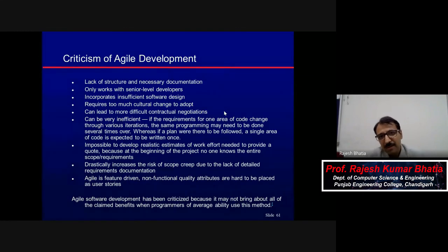But in this case, in 2 to 4 weeks, you have to identify those features and their importance, prioritize them, design them, develop them, and at the end get it validated from the client. And in between, if there is any question from a developer or any participant in the sprint, they can directly get it clarified or appended, and at the end of that sprint it will be accepted by the client, and then you will deliver immediately for further testing.